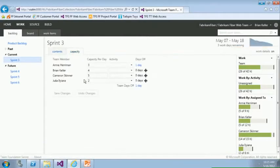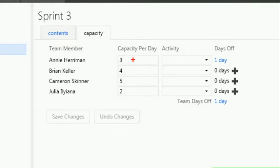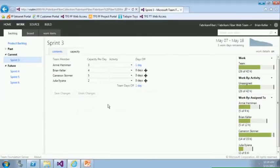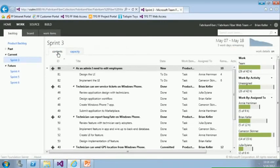We can set capacity on a per-team-member basis. Maybe Annie is a shared resource — we get her for three hours a day on this particular project, and she might participate in other projects as well. For this sprint we get her for three hours; for the next sprint, when we're locking down the UI, we get her for six hours. If somebody was out of the office for any reason, you could reflect that here and see the effect on your schedule in real time. That's the agile planning portion of the tools. If you're practicing Scrum, that's going to be immediately familiar. If you're not, these tools will still work regardless of the process template you use within Team Foundation Server.